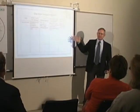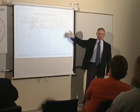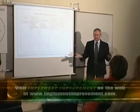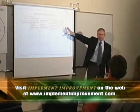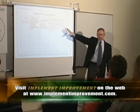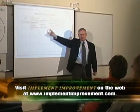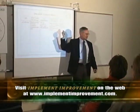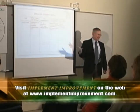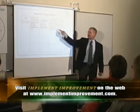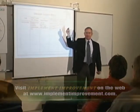This is really a planning phase activity. We develop our basic plan, then build the matrix to identify all possible problems. The problems we can prevent — we come up with preventive measures, modify our plan, and cross them off the list. The problems we cannot prevent, or choose not to prevent, we then have a first indicator and an immediate corrective action to nip it in the bud as soon as it starts.